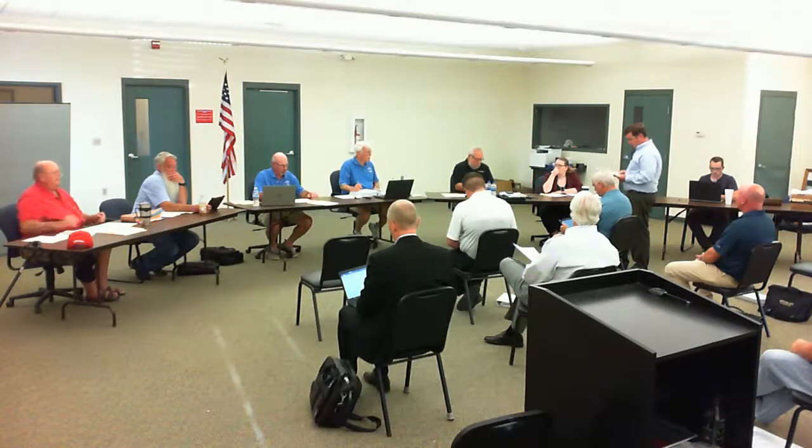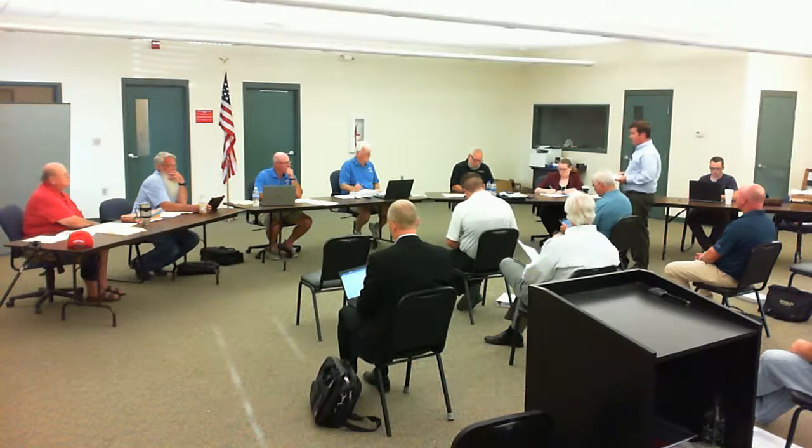After that work is done, we move into bidding. We're looking at advertising in August, opening bids in September, and then moving towards the one closing in October. Generally, those are the schedules for the project.